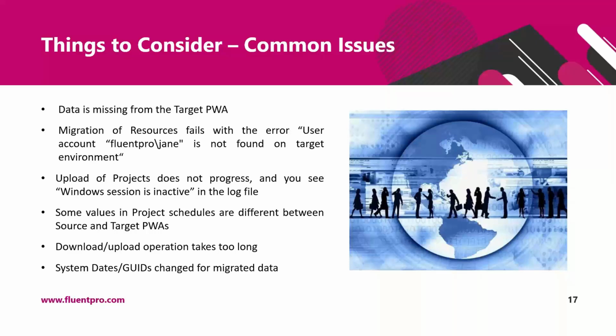You will also see this error if a user account was not created in the target environment, and sometimes you do not want such a user to exist in your target PWA. The enterprise resource will be created anyway, and all the resource associated data will be migrated, for example, rates, assignments, and all this data except for the user logon account.